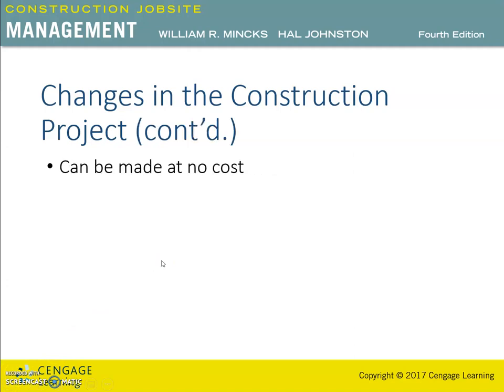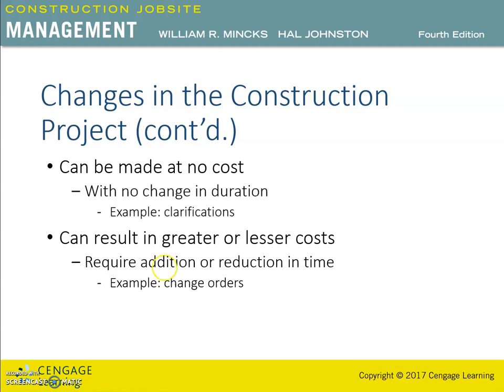So the changes can be made at no cost and with no change in duration. Perhaps clarifying a construction detail or an installation method. Changes also can result in greater or lesser costs and require an addition or a reduction in contract time. A change order is a settlement for including a change in the contract. Thus, a change order normally costs the owner more than the work that was included in the original contract document.